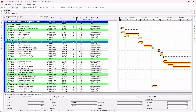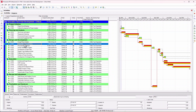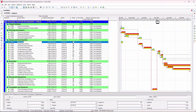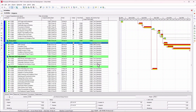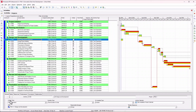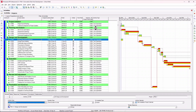Now I'm in Primavera P6. I want to create a level of effort for all the activities in this Design and Development WBS. All I need to do is create a new activity by clicking the plus button. I'll name it 'Level of Effort Design and Development.' I have a column here showing the activity type — as you can see, all my existing activities are task-dependent activities. I need to change this new activity's type: go to General, then Activity Type, click on it and select 'Level of Effort.' Alternatively, you can click the dropdown in the Activity Type column and select level of effort. Now we have a level of effort activity.